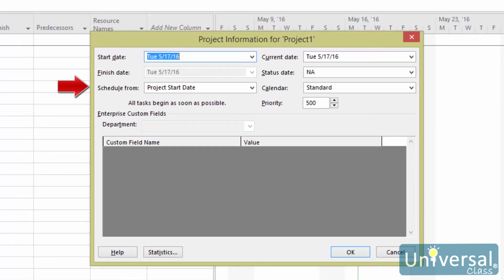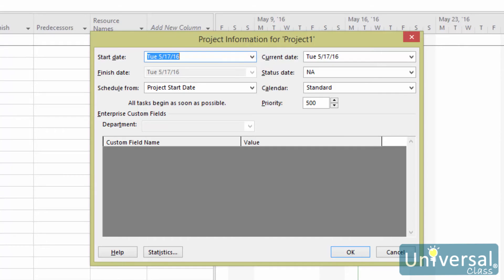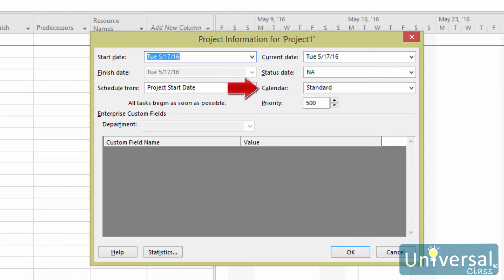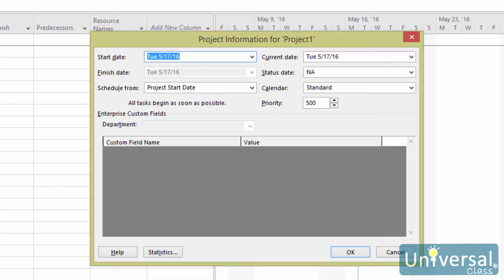Schedule from. Tasks can be scheduled backward or forward. Typically, it is forward from the start date. Current date. This will match the settings on your computer. You can change that if you need to list a different date. Status date. It is a good idea to set the current date in order to track progress. You will want to progress on the project in real time. Calendar. Click the drop down box and select a calendar. Priority. You will want to set this if you have many projects and want to link them together. It can also be helpful if you use the resource leveling tool that we'll talk about later in this course. Click OK when you're finished.